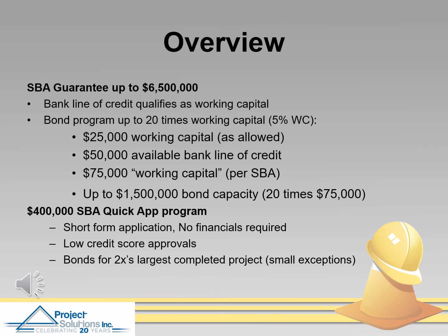Another option is sometimes referred to as the QUIC program or the QUIC application program. This is a program for projects of up to $400,000. There is a short form application with no firm financials required as part of the application. This program is for firms with low credit scores or maybe unestablished credit. The bonds will be for 2 times the largest completed project that the firm has worked on.